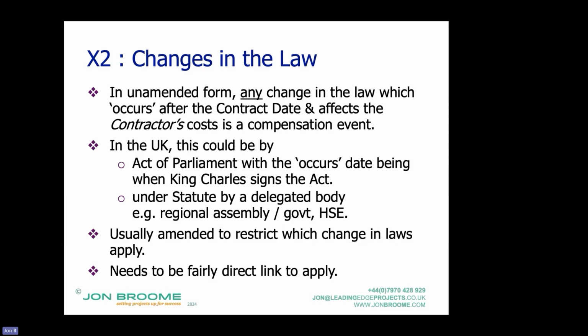So that did apply. Final comment on it, which is not on here, is just be aware of contractors getting double bubble, as in they get a compensation event for the increase in fuel costs, and then inflation occurs, and they retrospectively get an adjustment to the prices for inflation, caused in part by the increase in red fuel. So that's normally taken into account when assessments are made under this.